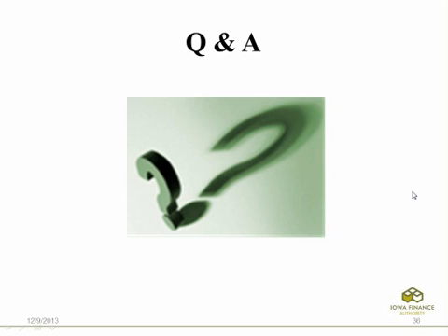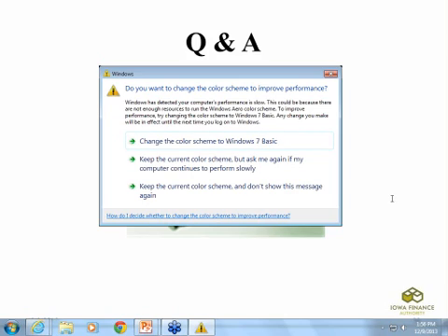Site limiting action examples. Some things you can do that don't limit your site, some costs that you can incur that don't limit the site, are pre-engineering surveys, any soft costs that have gone into the project so far, things like that. Site limiting would mean that you do something that begins to put that property in your name. If you close on the deal, you cannot take ownership of the property prior to getting environmental clearance from HUD. Anything that you do that could limit your project to that specific site would exclude that project from being able to receive HOME funds.